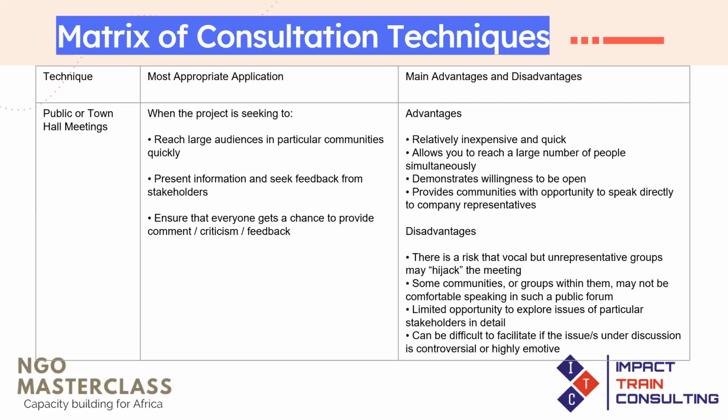So you could decide to do a focus group of that section of people that were not speaking, or you could do a survey, or you could do a private meeting with them if your project has the resources to do that. But it's not always advisable that you use one method of data collection.